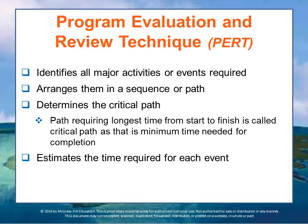A PERT chart identifies all the major activities and events required to complete a project and arranges them in a sequence or path. This determines what's called the critical path, where there may be bottlenecks, where multiple processes come together, and where there are contingencies. Based upon this, one can estimate the time required for each event and pay particular attention to the critical path to make sure that bottlenecks don't develop in the process.